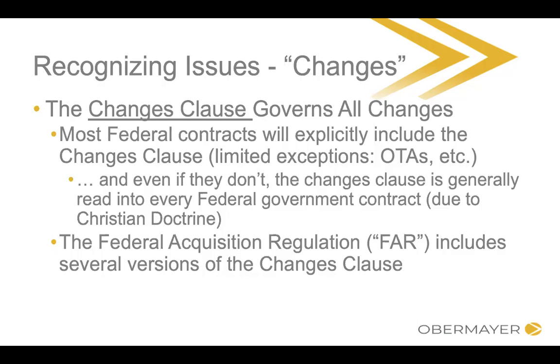And the idea of that doctrine is that even if, with regard to the most important, seminal, fundamental FAR clauses, the court is going to basically take the opinion that even if the government forgot to cut and paste it into your particular contract, they probably meant to, because it's such an important clause. The courts are going to read it into the contract as if it's there anyway.